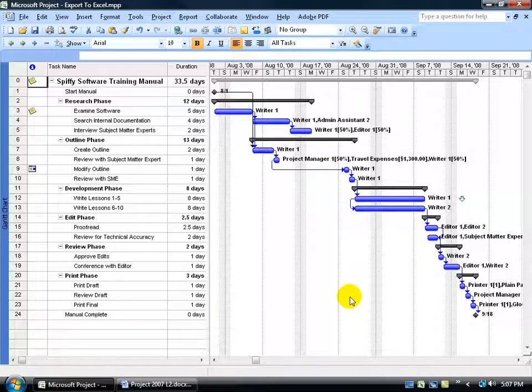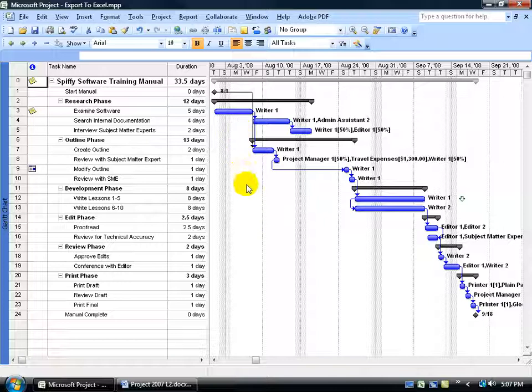Now that I have the status date set up, I can come over here in the Gantt chart and be able to set a progress line for that status date. It will draw a red line on that status date and then I can tell if we were ahead or behind at that point in time.